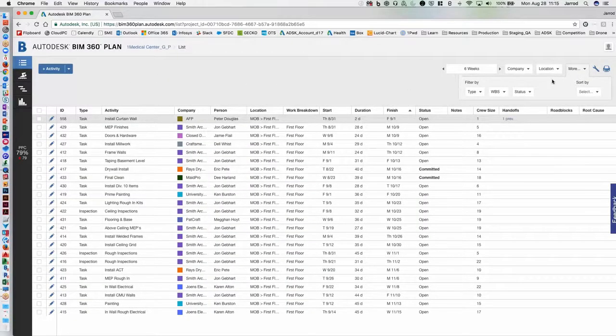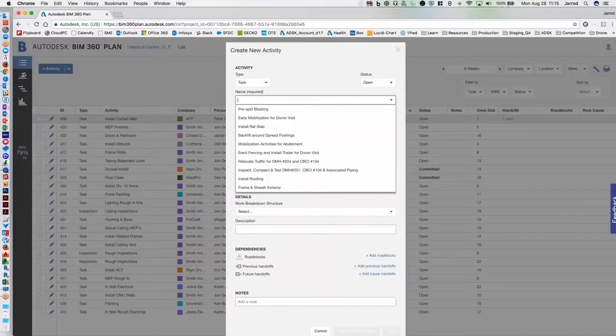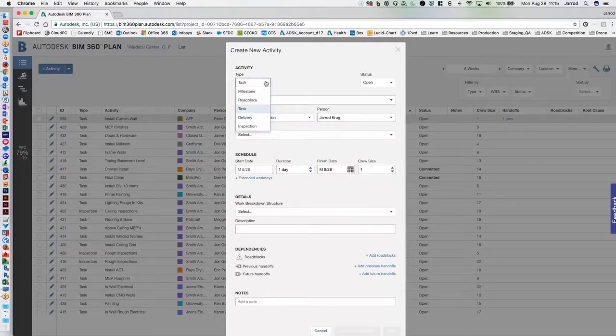Okay, so let's then go to, I think one thing I didn't cover is the different activity types. So we do get to accommodate just straight up incremental adds of activity. So I've got a task, which is really just the root type of activity we can add. You can see here I can add a milestone. So as I stated, we want to be able to bring those milestones back. Normally those are 9 to 6 weeks, and we work backwards from there. So those are actually defined, very consistent CPM look and feel, and a little upside down triangle.